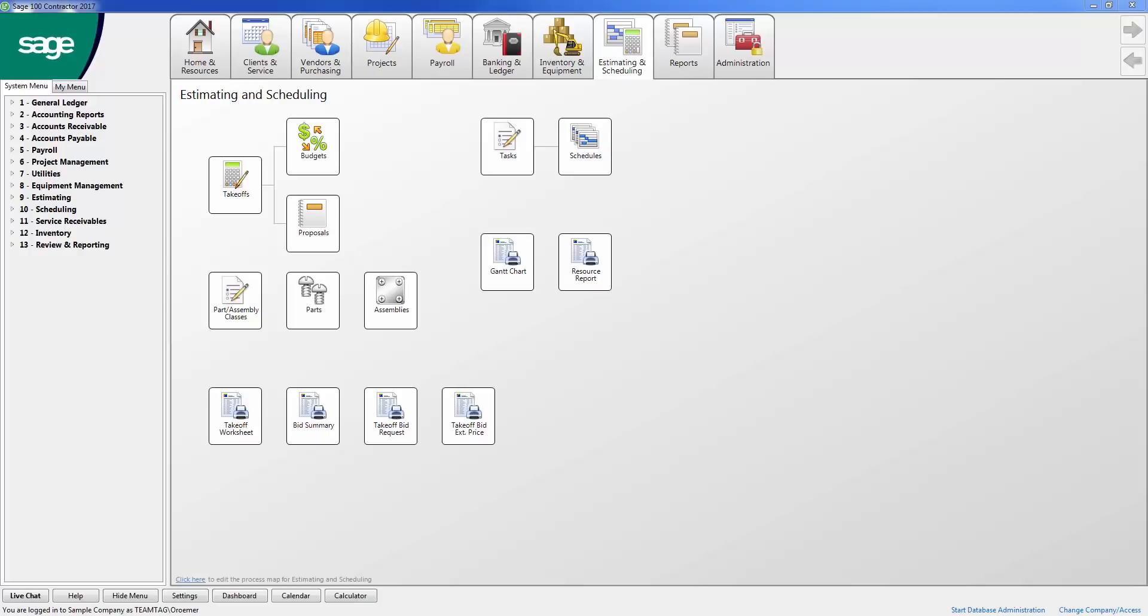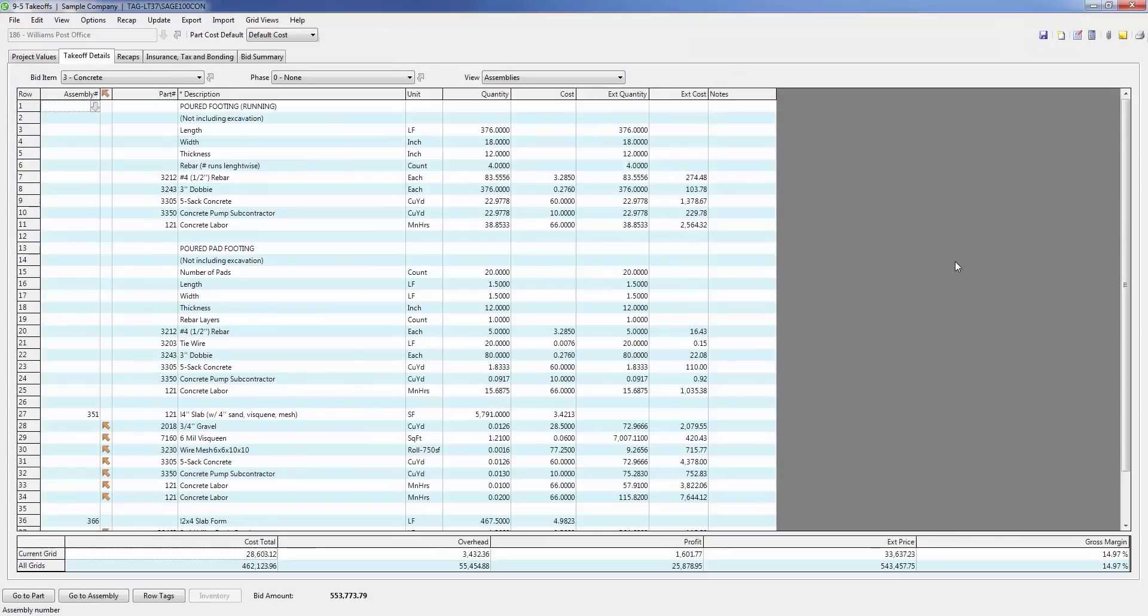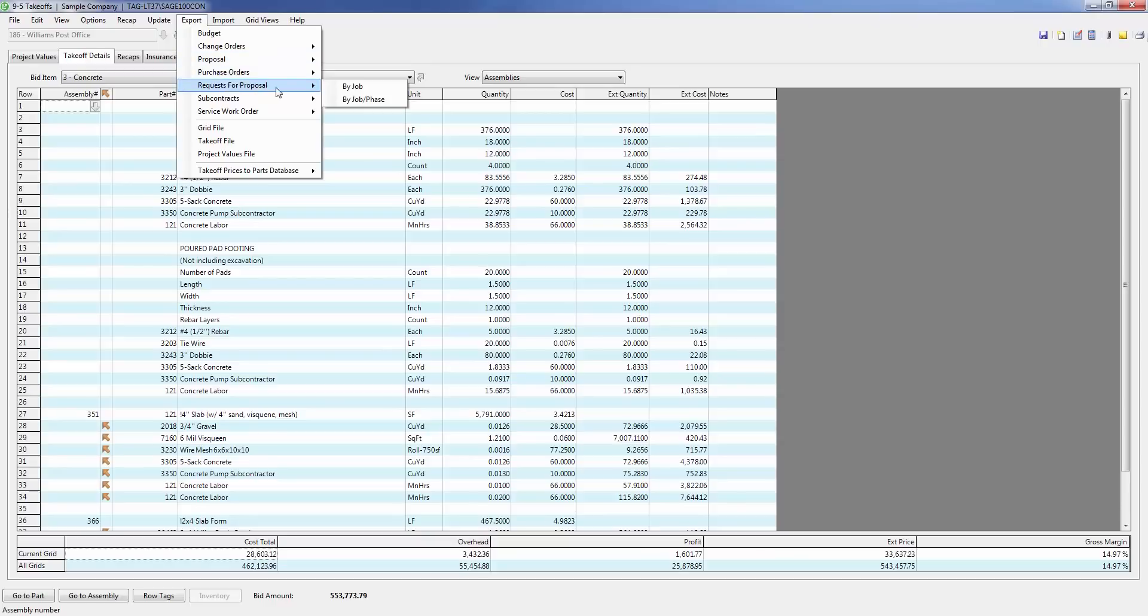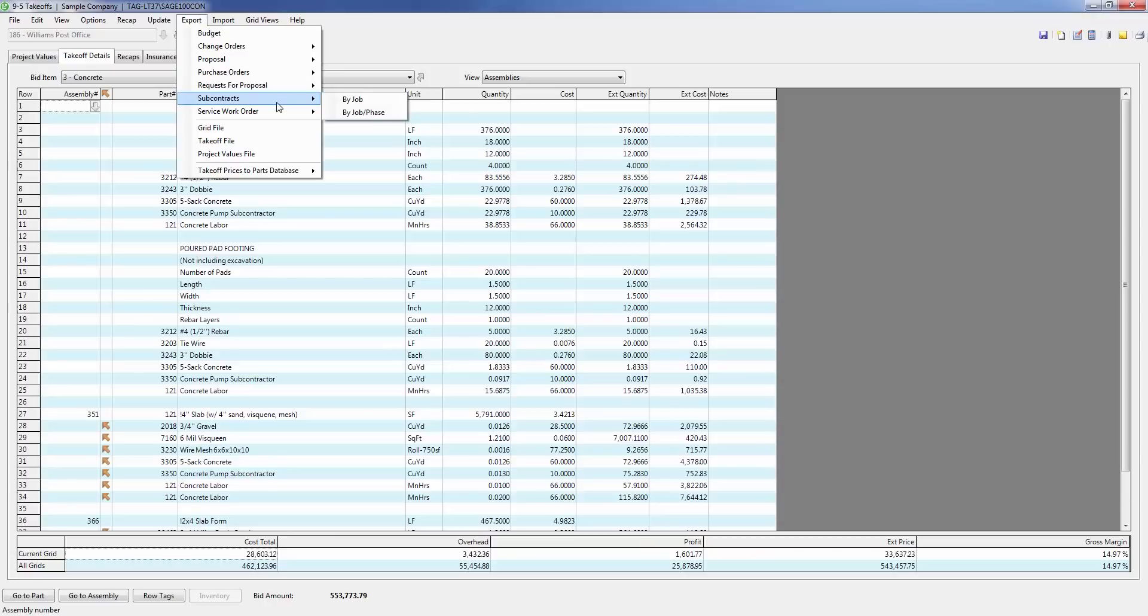As you see here in the estimating module, I will start with the takeoff. From this screen, I can export this takeoff into a budget or proposal, and details related to my vendors can be converted into requests for proposals, purchase orders, or subcontract agreements.